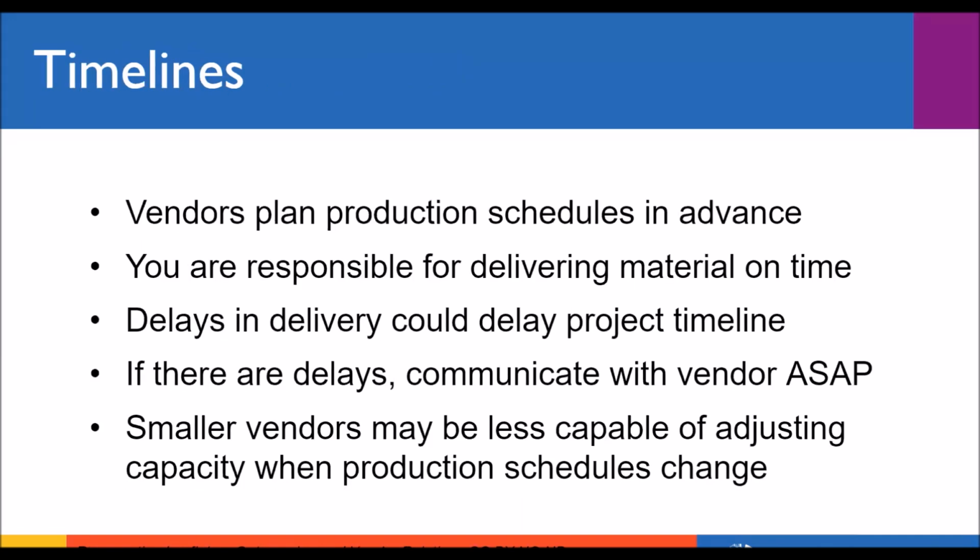Okay. I do want to add some additional notes regarding timelines. We discussed earlier how timelines can have an impact on your decision about whether to use a vendor, and that you should include any relevant deadlines in your RFP and your eventual contract with the vendor. You should also consider that timelines can be affected by when the project actually begins. So vendors plan their production schedules in advance, and they do this to maximize equipment and their personnel resources. But they're also doing it to ensure that they can meet other clients' deadlines.